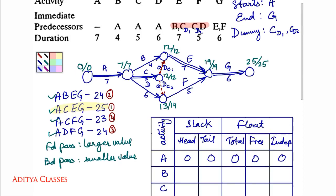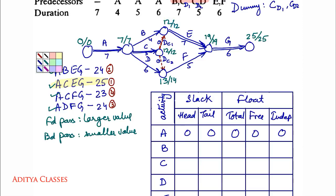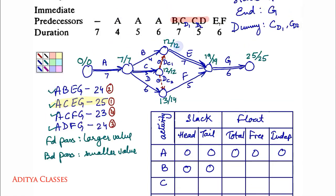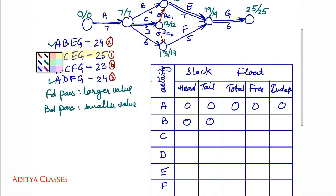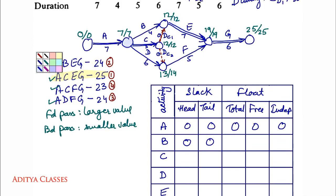For activity B: head slack is 12 minus 12 equals 0; tail slack is 7 minus 7 equals 0. Total float: 12 minus 7 minus 4 equals 1. Free float is total minus head slack. Independent float is free minus tail slack.